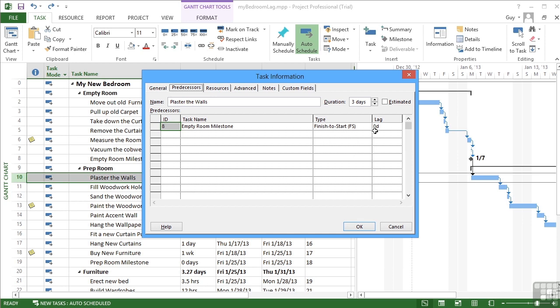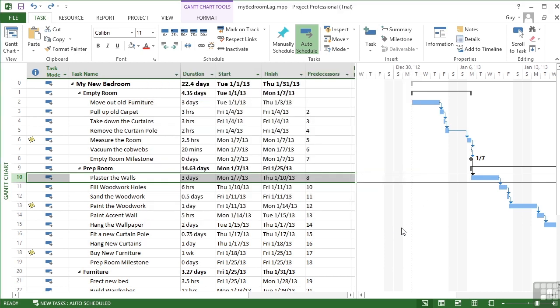Now the reason that you might need a delay is for things like allowing the plaster to dry. When we order our furniture, there's a time before the furniture arrives. So we have to build all that into the project to make it realistic. Otherwise, we're not going to be able to keep to our plan. So how do we add in some lag?